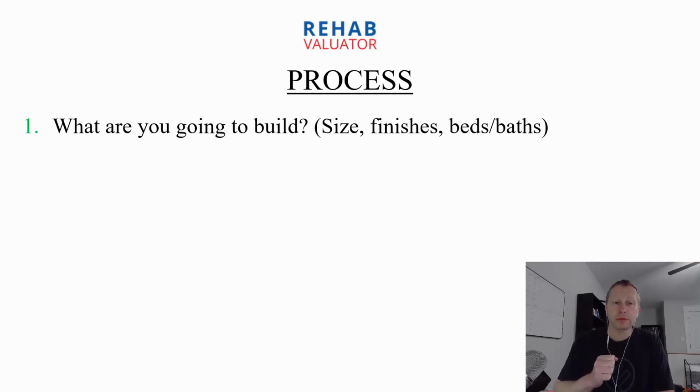Step 1, figure out what you're going to build. Rule of thumb is always start at the end. Even if you're staring at a raw piece of dirt, start at the end. What are you going to build on this piece of land? Is it a single family home, duplex, 100-unit apartment building? How big is it going to be? What's the unit mix? Bedrooms, baths, sizes? What are the finishes? This is what I'm going to build.